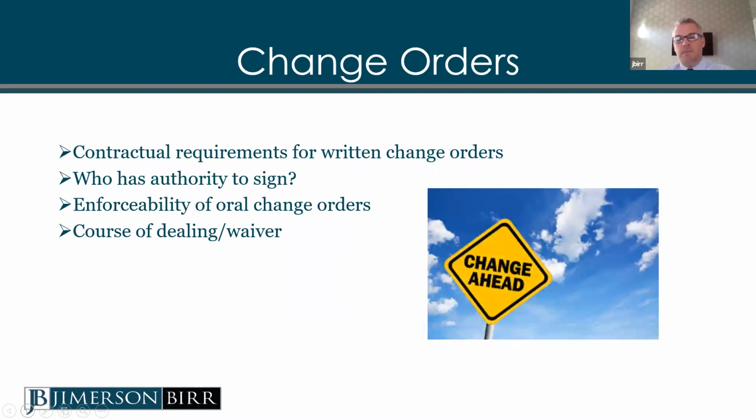Change orders. Deal with those all the time. They are mini contracts, and they can change the contractual requirements. There are usually contractual requirements that spell out how a change order can be executed, how it's enforced. A lot of times it will require the parties to both sign it and only certain people to sign it. So you want to be paying attention to what the contract provides in terms of the enforceability of those change orders. I've had situations where someone makes an argument that the person who's supposed to sign the change orders never signed them, therefore they're not enforceable.